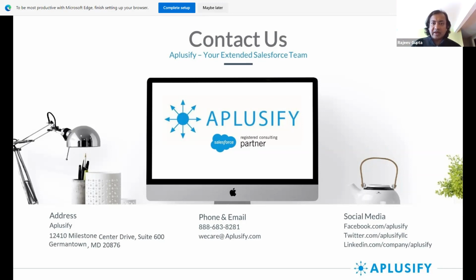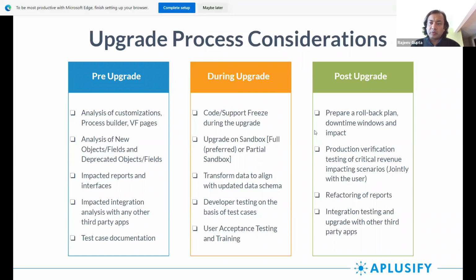And one of the challenges that I have seen is really across the board. So many times we get in a relationship where the previous contractors or somebody accounted only for the software upgrade, and there was a line item in their SOW with their provider that said all the data related upgrades or expenses will be borne outside this scope of work. As soon as somebody wrote that line, it is 30 hours of work. It itself is not much work, because all you are doing is upgrading the software, not really the data. Bulk of the work is in testing and data.